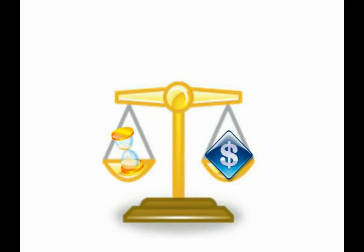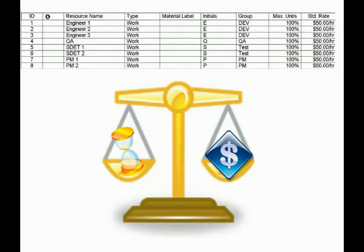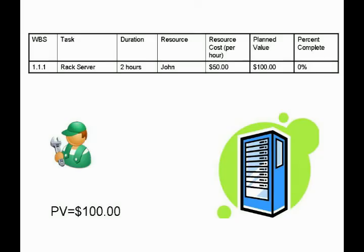Each task is assigned a duration, not a dollar amount. But thanks to the transitive property of time equals money, you arrive at the monetary value for each task. You can do this by loading a burdened hourly rate for the resources assigned to the task and multiplying it by the time scheduled. For example, a server racking task allocated two hours for a resource with a burdened rate of $50 an hour gives a planned value of $100.